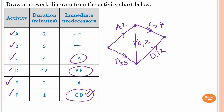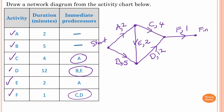The last activity is F. We know C and D are immediate predecessors of F, so we start from that vertex. This is activity F with a weighting of one. You can write 'start' here and 'finish' here.